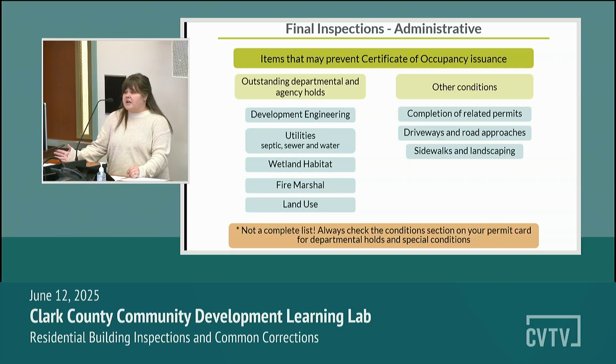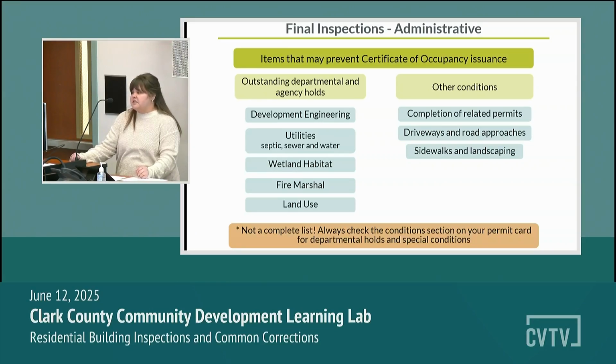So you're not waiting a week or two, possibly, after you've gotten your final building before you can start moving into your new house. Some of the departmental holds could be from development engineering, wetland habitat, fire marshal's office, or land use. It could also be from your utility purveyors regarding your septic system, your sewer, your water. And then sometimes there are other conditions on the permit that need to be completed.